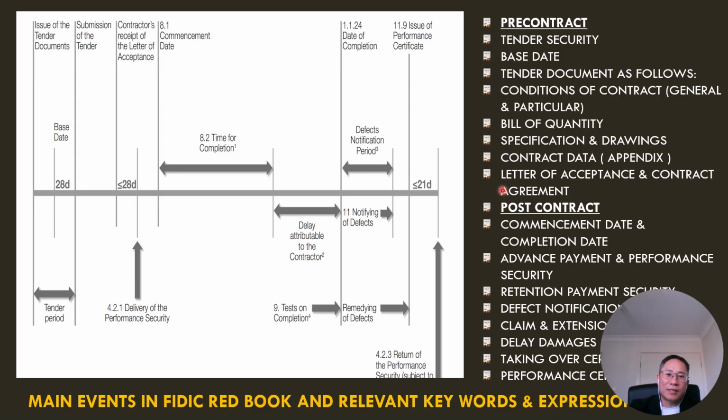But keep in mind, the contractor must obtain the performance certificate issued by the employers. Otherwise, the process is not considered complete.